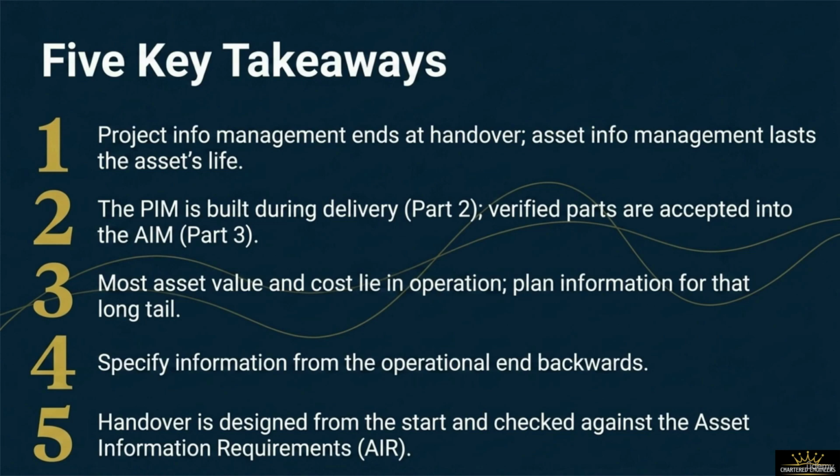Third, because the vast majority of an asset's total value and financial cost sit within the operational phase, you must plan your information frameworks to serve that long tail. Fourth, you must always specify your data requirements from the operational end backwards. Finally, fifth, handover must be engineered from the start and checked rigorously against the asset information requirements. Let's run a quick knowledge check to validate these takeaways.